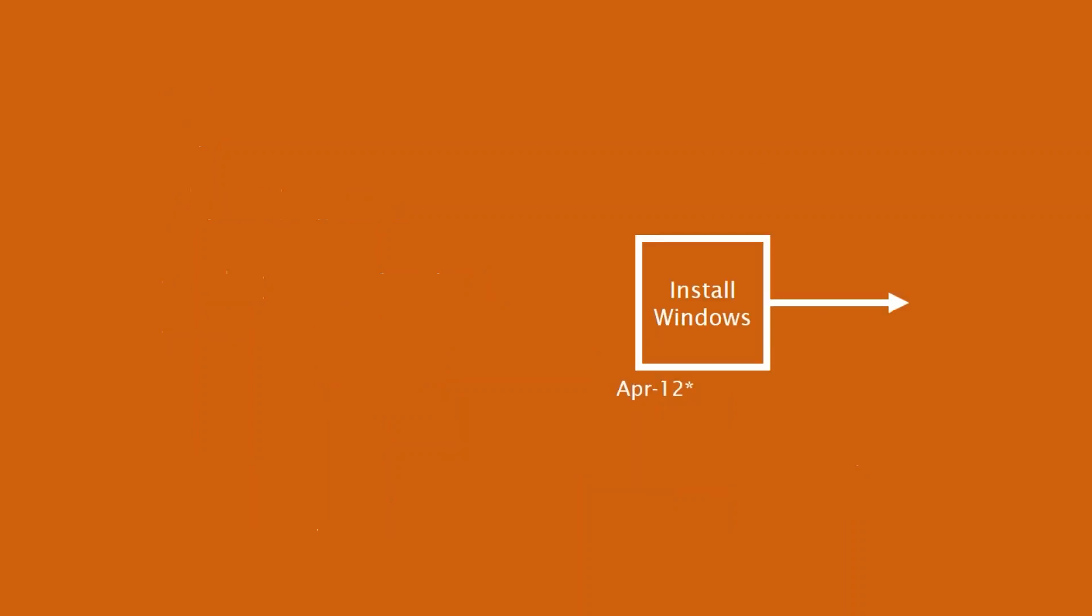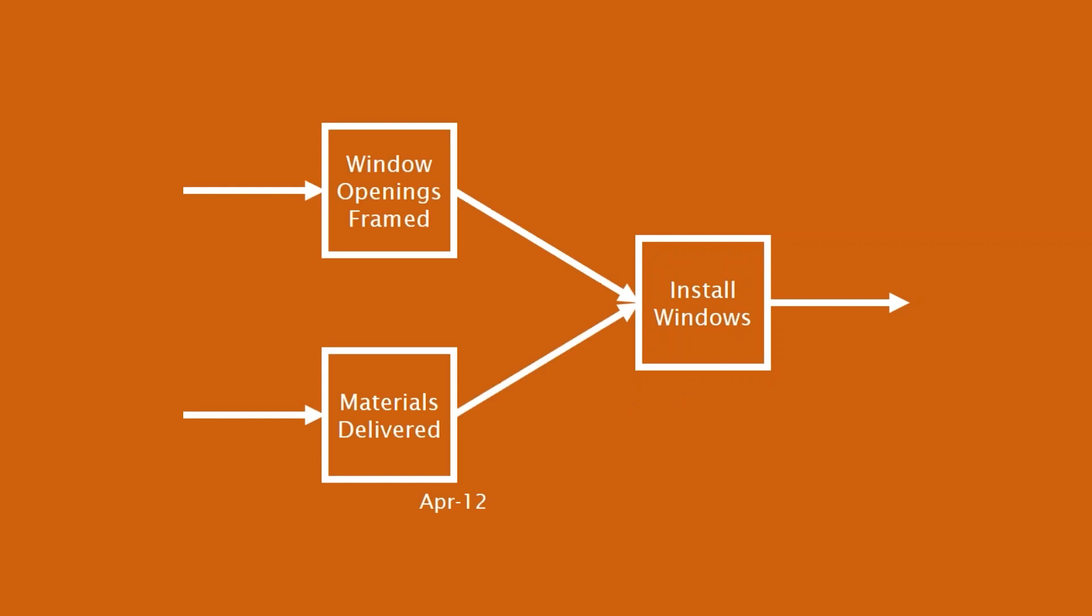This is the sort of thing we see with newbies all the time. So new users of project management software, they are of the mind that we should define some activities and then stick those activities to dates. And one way to stick activities to dates is by putting constraints on them. So if this was part of my schedule, just a standalone activity hanging out on its own, install Windows on April 12th, that's not great. We don't want to use constraints to replace logic. So what we should do, rather, is we should have predecessor activities that lead to that install Windows, rather than just applying a constraint to an activity to hold to that date. Logic is more important.